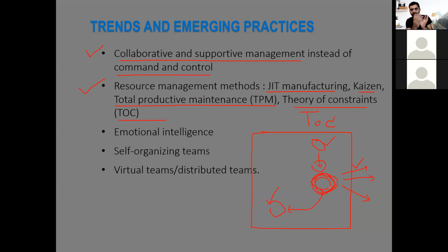Remove all additional extra work from this component, or for example, this human resource, this team member, so that he or she can focus on the key things for which this role or component is there in the organizational structure or in the system. But after that, once this change is made, we again check the whole system and see if it has improved, if the bottleneck is removed or not. If it is still not removed, the next step is we add more resources to this component.